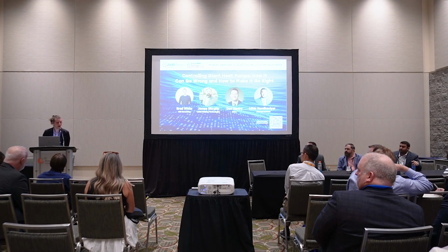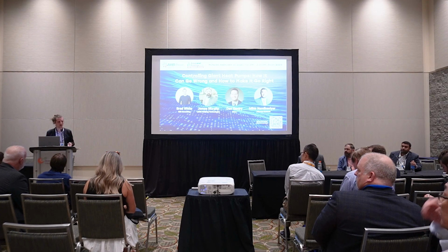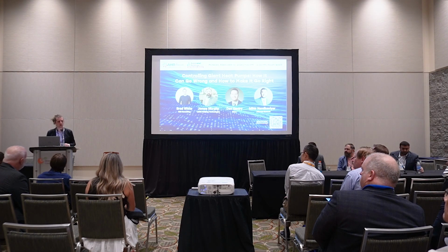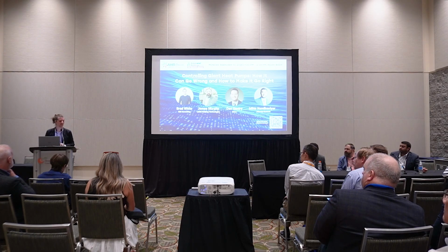They're going to have GHG performance standards that certain buildings have to meet. The only other way in my mind is to make sure that everything through commissioning is dialed in, that you've actually made sure that's happened as best as you can, and you've got it all signed off. At that point at least you can demonstrate that the system is operating as it should. After that, absent some sort of reporting, like energy reporting or emissions reporting, there's not a lot you can do that I've seen. So the approach we take is make sure that thing is working as best as it possibly can and demonstrate that performance as part of commissioning.